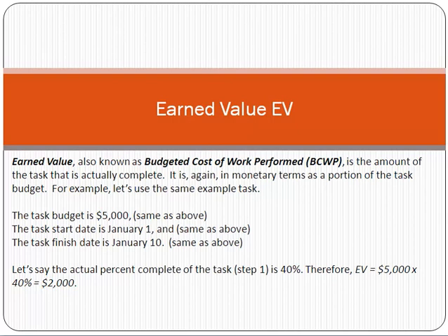Earned value means the actual work which has been completed, and the formula is budget multiplied by the actual work completed percentage, so you can get the earned value.